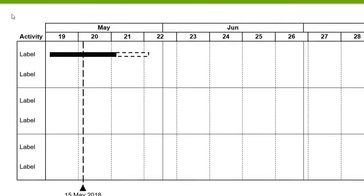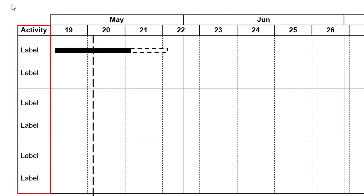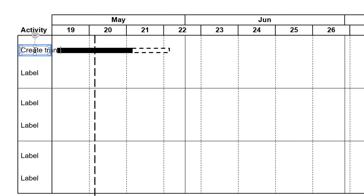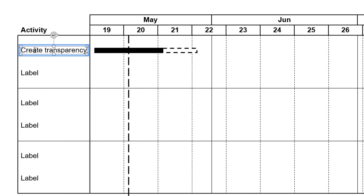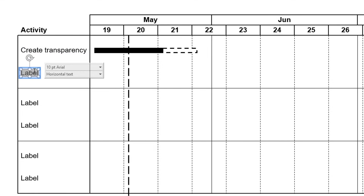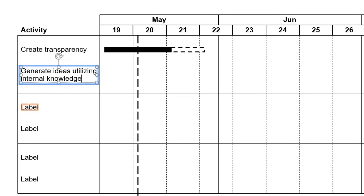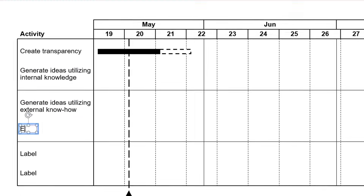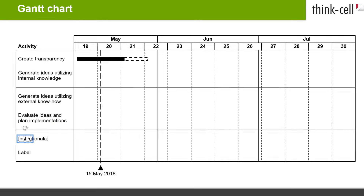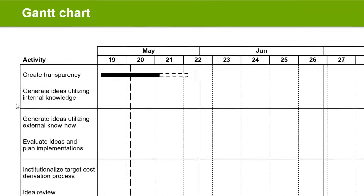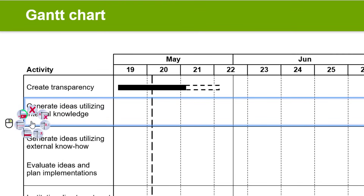Now that we have set the time range of the chart, let's start editing the Activity column. It labels the different activities of the project. Click into the Label Placeholder and type in your text for each row. The width of the column will automatically adapt to the text you enter. To control the width of the Activity column, hit Enter to wordwrap your label text. To add more rows, right-click into the Activity column of a row and select Insert Row.